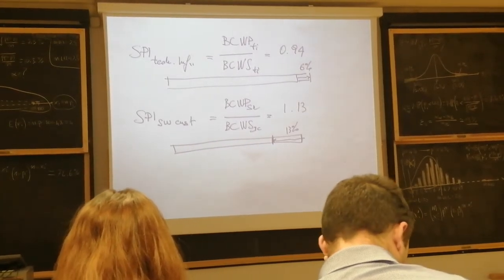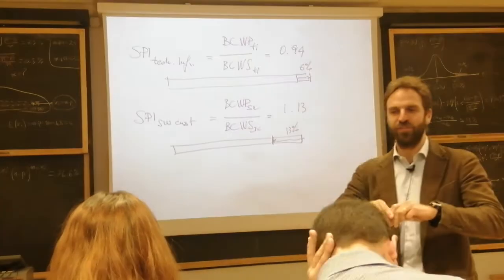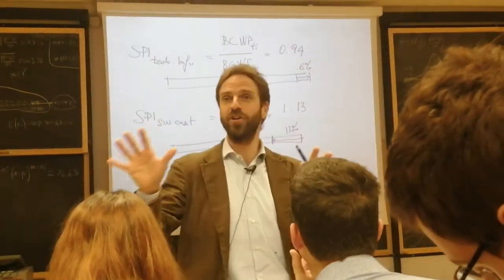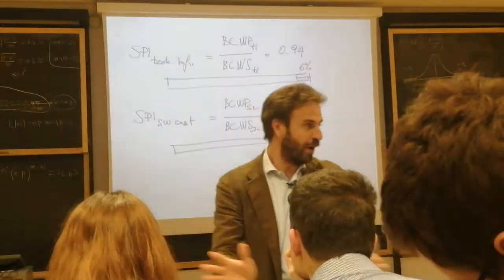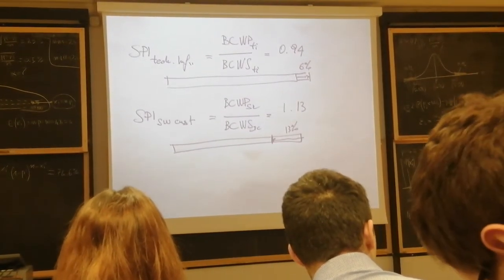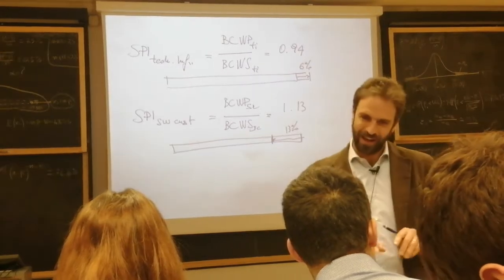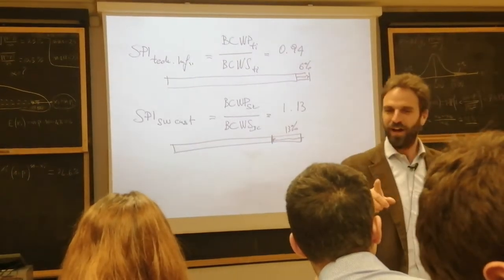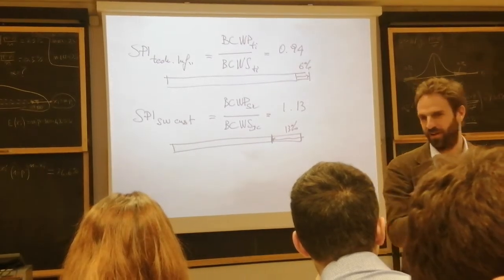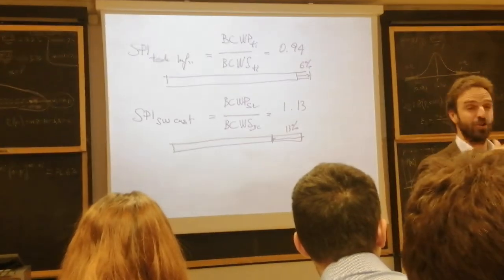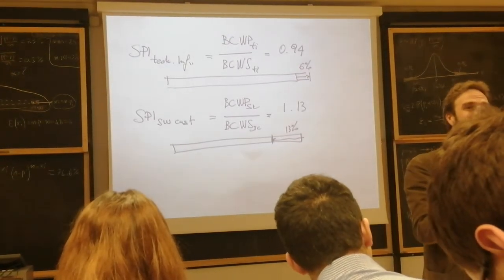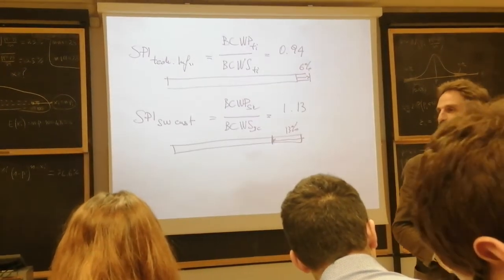Unless you get the programmers, who finish earlier, and you ask them to help the systemists. But if you are a good programmer and you can code in Python, are you also very good at doing all the system architectures? No. So you are not an interchangeable type of resource. So we get the project late.